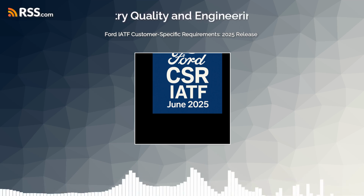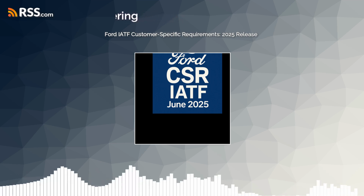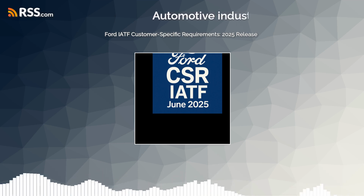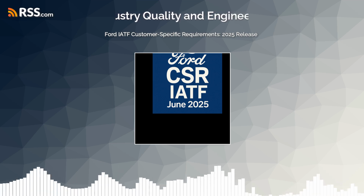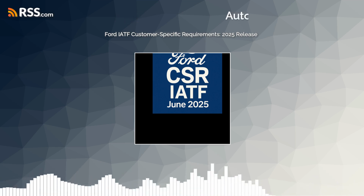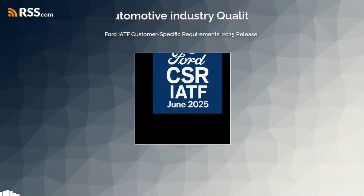Why is financial stability considered a quality requirement? That seems unusual. That's a great question, but it makes perfect sense when you think about supply chain risk. A sub-tier supplier facing financial distress might cut corners on materials, delay investments in equipment or process controls, or even risk sudden closure, all of which can severely impact the quality and delivery of parts up the chain to Ford. Ah, okay. A shaky supplier is a risky supplier.